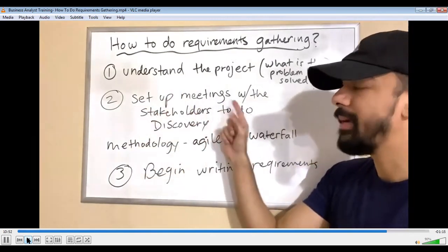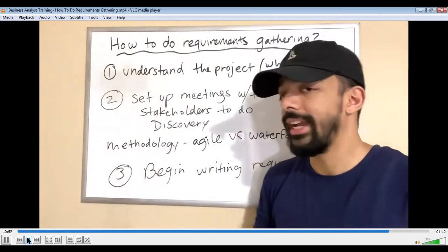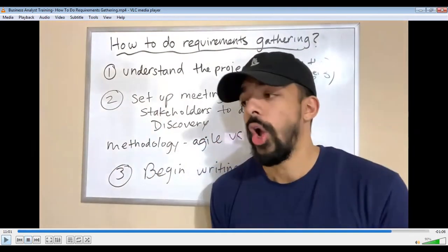Now, when I say set up meetings, these are meetings, plural, multiple ones. More than likely, you're not going to get all the requirements in one meeting. This is really crucial. Normally what we used to perceive is that requirements can be closed in one meeting, but that's not the actual practical scenario. You at least will have 3 to 5 meetings, believe me, for requirements. Even in a simple scenario like we discussed about enhancing the attendance management system, when you implement Iris Reader.